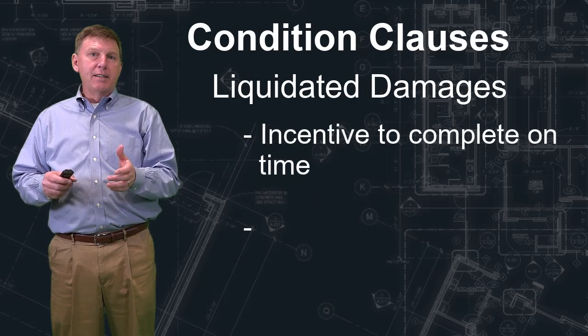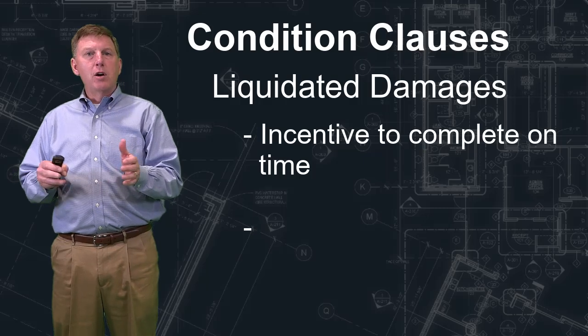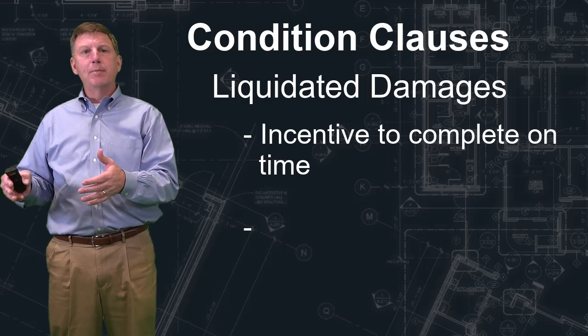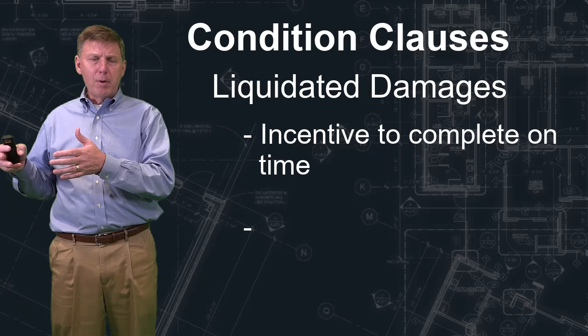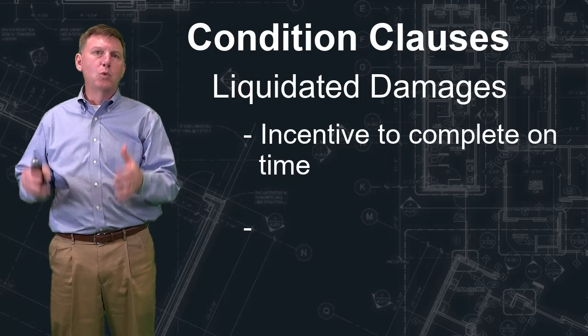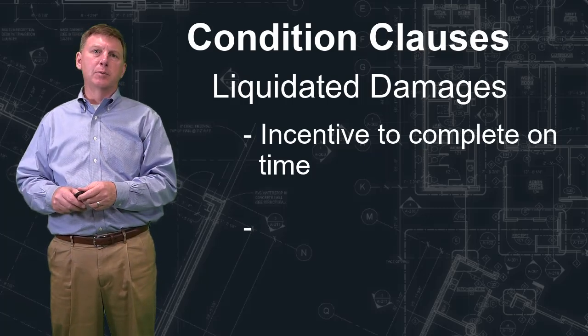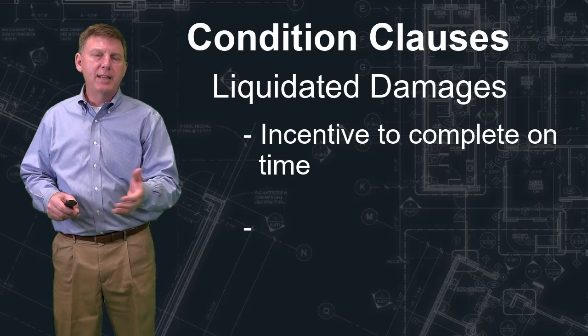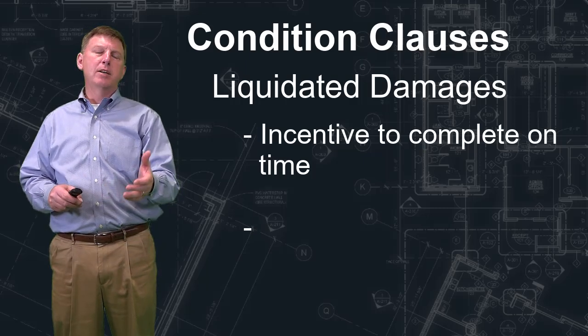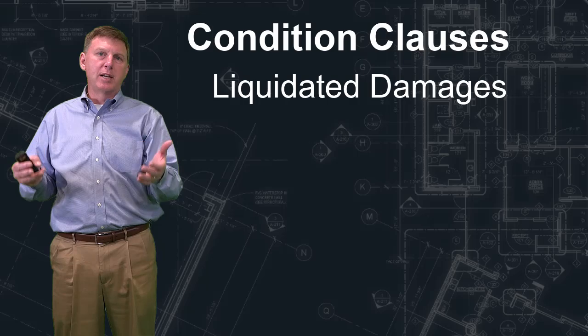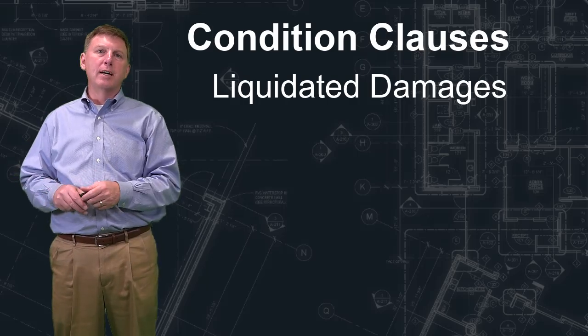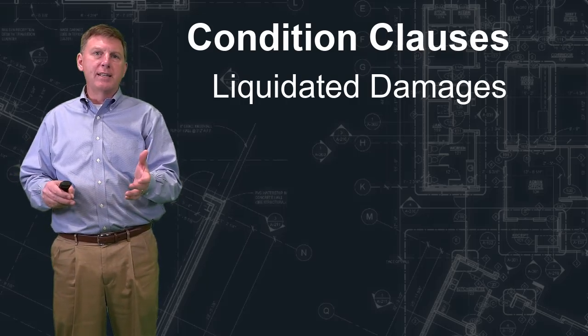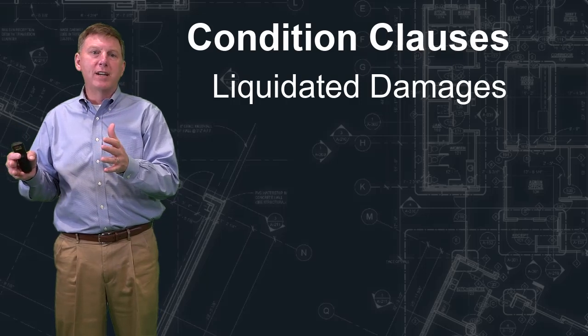Now, it is an incentive, however, right? If you know as a contractor you're going to have liquidated damages at the end of a project, you'll want to make sure to get that job done as quickly as possible. You're motivated anyway. Every day you spend on a job past the day that you were scheduled to get it done, it's costing you overhead. So you're still motivated to get it done. This is just more motivation.